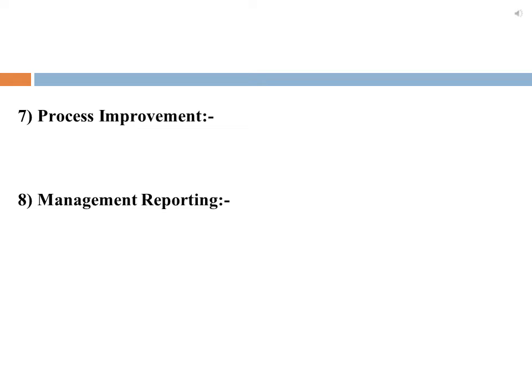Participants should go back to the process that originates the defect to understand what caused the defect. Then they should go back to the validation process that should have caught the defect earlier. This process can provide valuable insight into how to strengthen the review process. This human factors dimension alone, according to some of the people researchers interviewed, can have a very large impact on the effectiveness of the review process.